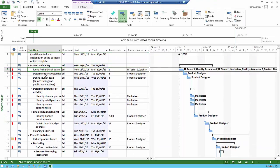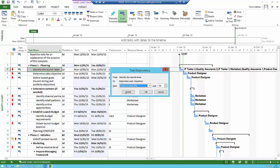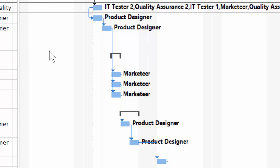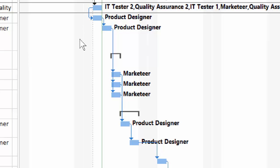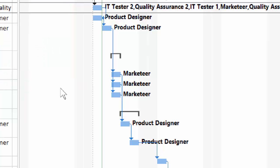When you've planned out your work breakdown structure, tasks link to each other. For instance, 'Identify the launch team' — when that task is done, 'Determine the sales objectives' will be the next task. They're linked with a finish-to-start relationship: you finish one task and then start the next. You can double-click the arrow on the Gantt chart to see the relationship. You can also change that relationship — for example, to a start-to-start to run tasks in parallel, which brings the project duration in, or to a finish-to-finish. The template comes with relationships between tasks, but they can be changed.